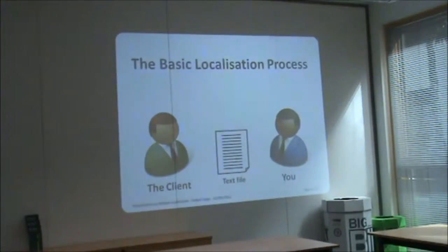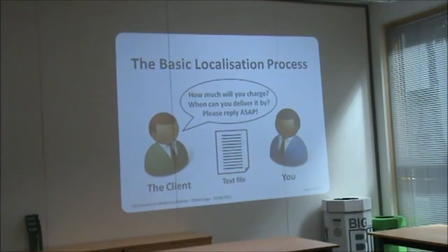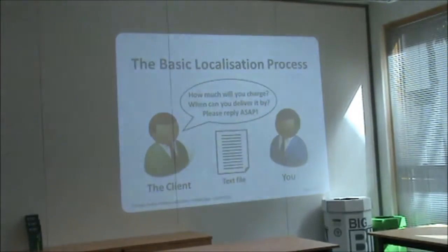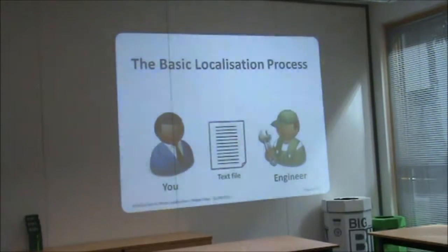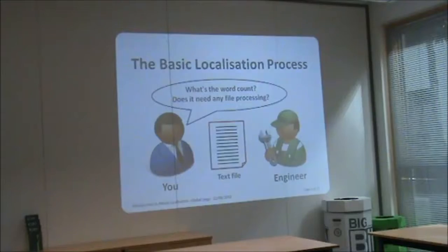Okay, so the client comes to you as the project manager or the sales representative and says, I have this text file, how much will you charge? When can you deliver it by, and please reply as soon as possible. This is the basic information you want to know. So with a text file, you might know what to do yourself as a project manager, or you may consult with a file engineer. And essentially what you need to know is what's the word count, and does it need any processing of any description.